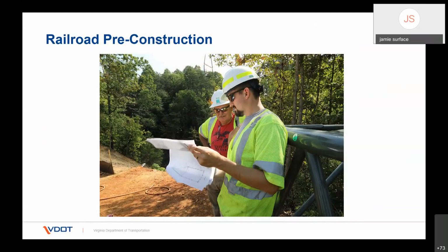But that's really where the contractor, the project sponsor and the railroad get together. They discuss what the aspects are. They discuss the timing and scheduling of the project, and they determine exactly when the project's going to start, exactly when it's going to end, and they go through the critical aspects of it. If work is going to be required where you have to cross the railroad, they're going to determine exactly how that happens. They're going to really discuss the means and methods the contractor has for the project. Next, please.